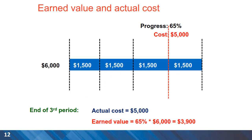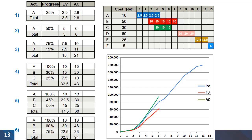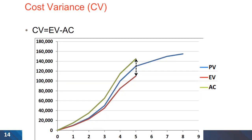Another important analysis is the comparison of earned value and actual cost. In this example we have made 65 percent progress, so the earned value is $3,900, but the actual cost obtained from the accounting department is $5,000, which is more than the planned value. Earned value and actual cost are given to us, and we can analyze the situation of the project by plotting the three curves.